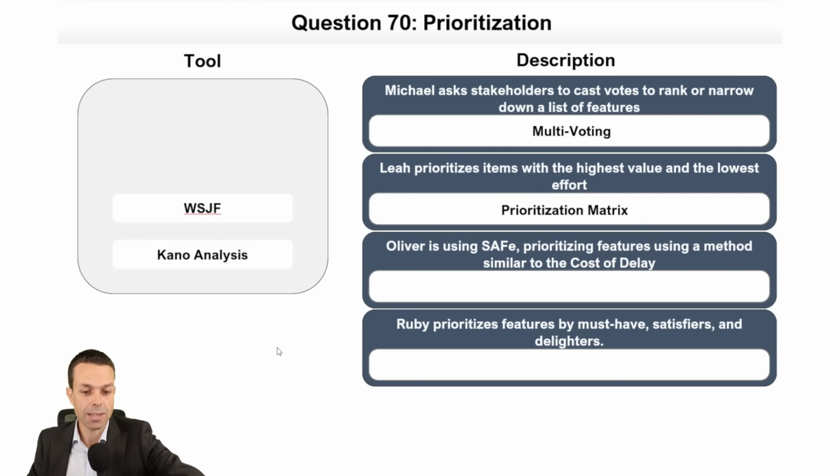And that just looks the same as our other matrices. That is just like this with the 1 to 10 of highest value and lowest effort. If it's low effort, we can put it as a 10. And we want to be doing the ones with the highest value and the lowest effort. Pretty simple and a good way to prioritize.